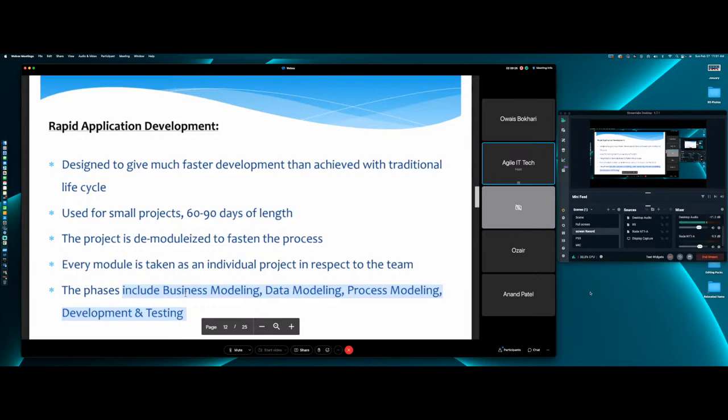With a team of five members, if I was to develop this product in a traditional manner, meaning work on one piece, then another piece, then another piece, it would take me with one five-member team 3 months to develop each component of my vehicle. So how long will it take me to develop all the components of my car? 18 months. How did you come up with that number? Because you had 6 components, 3 months each, 6 times 3, 18 months.